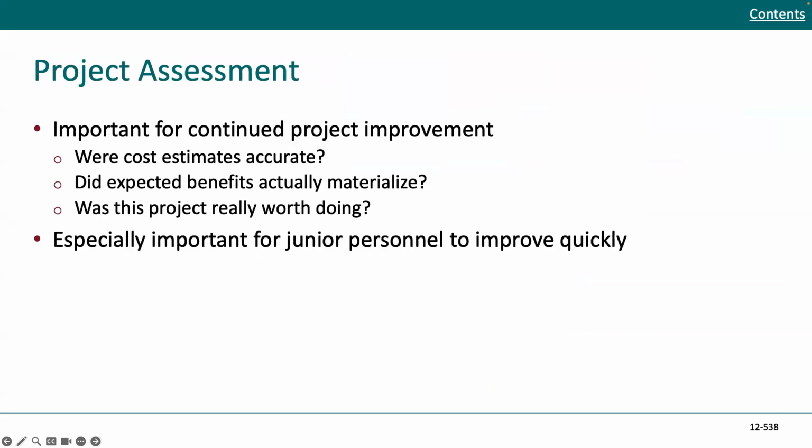For project assessment, it's important for continued project improvement. And you could be asking these questions: were cost estimates accurate? Did the expected benefits actually materialize? Was the project really worth doing? And it's especially important for junior personnel to improve quickly.